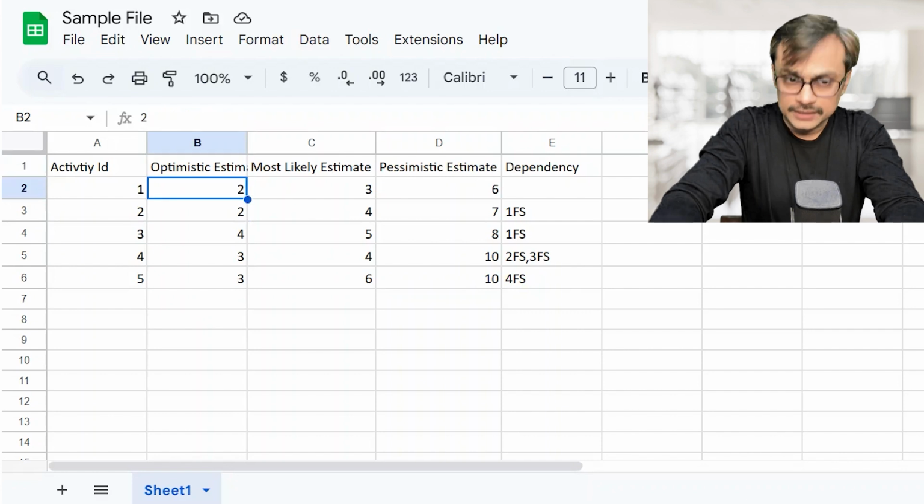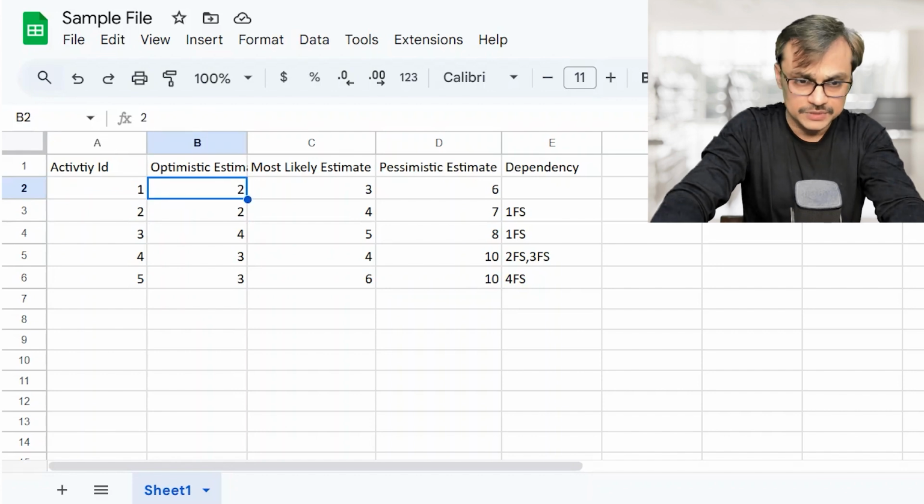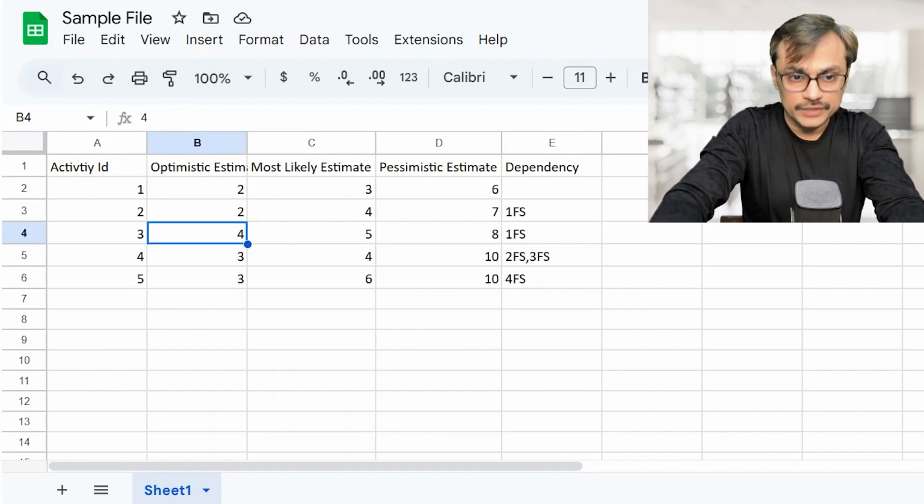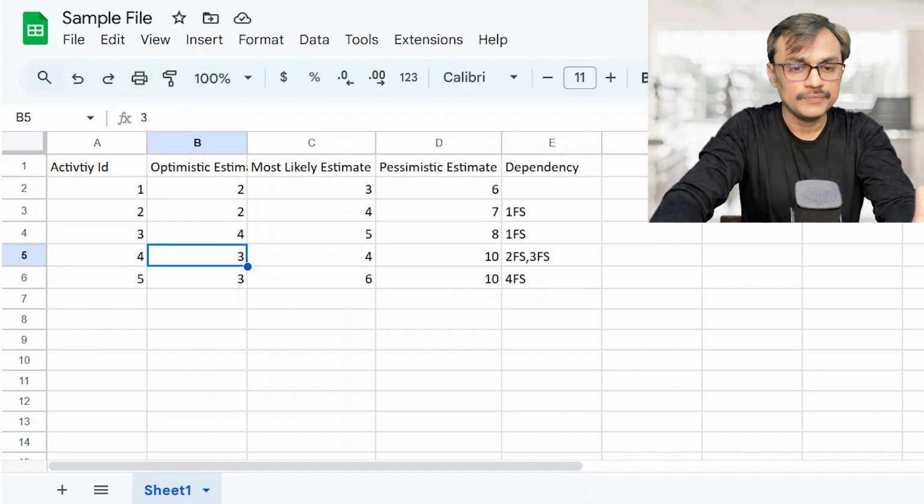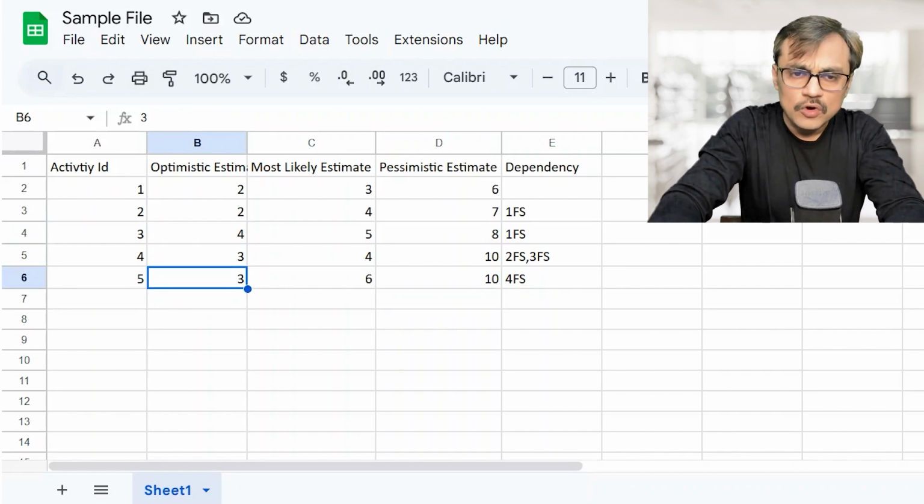So if I look at the critical path, the optimistic critical path, then I understand the first duration is of activity 1. Then out of activity 2 and 3, I need to take the maximum one, and then 4, and these are the ones which are happening in a sequence. So I can understand the most optimistic critical path in this particular data set is 12. Now, how will this whole thing come up when I do a Monte Carlo simulation?